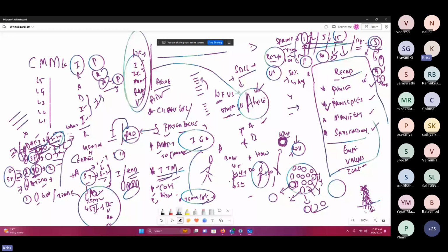So for example, I told you about this diagram, where I have some smaller chunks. I'll take these user stories for sprint one, sprint two, sprint three, sprint four, sprint five, sprint six. I'll take each into one particular sprint as independent things, and if there is any dependency, I'll club them into one particular sprint and then deliver it.